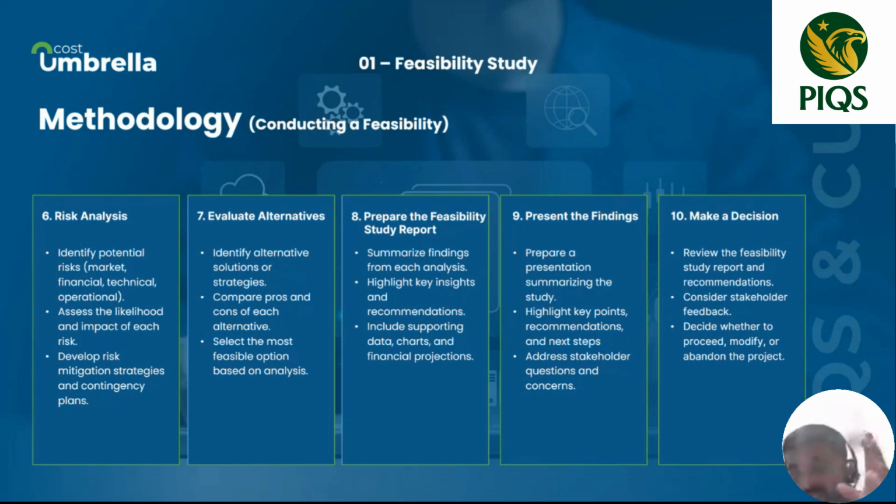You have to identify each and every incident you have listed down. Then you have to say, okay, what is the probability of each and every event, and what will be the impact if that event happens? Again, I'm telling you, not every risk is a negative risk. There could be positive risk as well, right? Suddenly the government announces, you don't need to have this regulation. It's too old. We don't need it. That may give you a positive side of benefits as well, right?